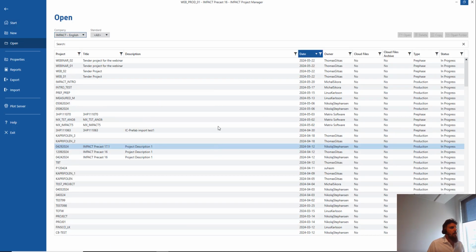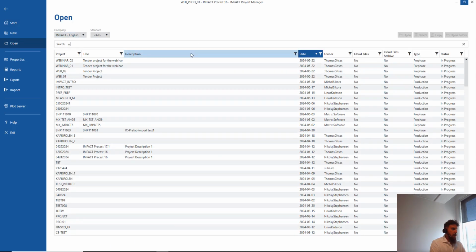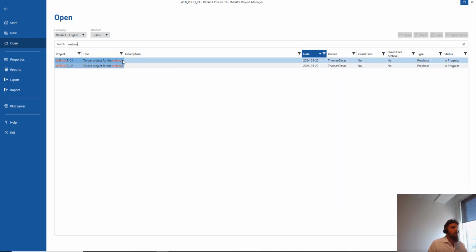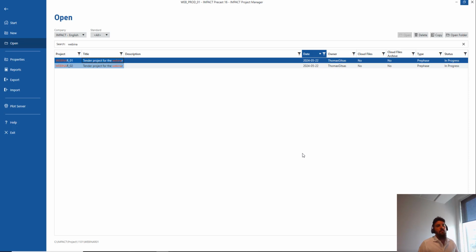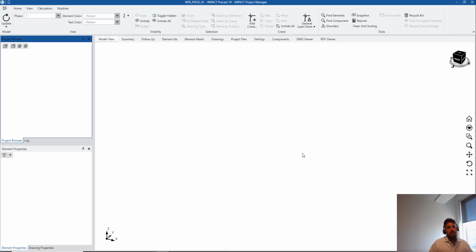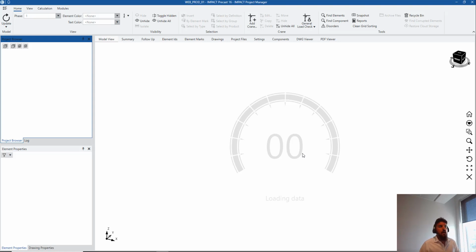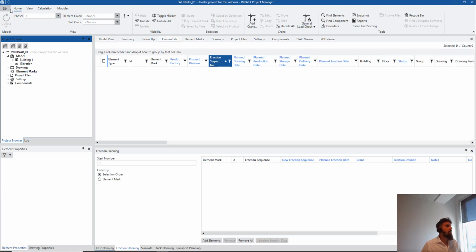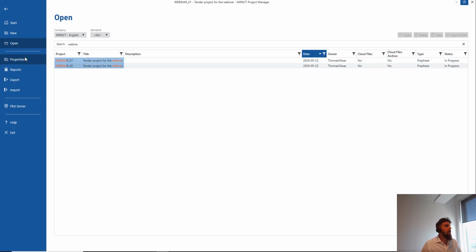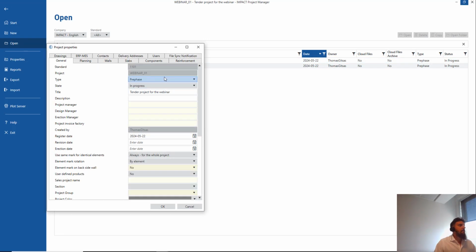So I will open and I will just write this project called webinar 1. Let's take this one and open it. What is the difference between a tender project, which I will show you now, called a pre-phase project, and a production project? If I come to the project properties here, you will see that this project has a type pre-phase. Most of the projects, or all of the projects that you create in Impact, are usually production.